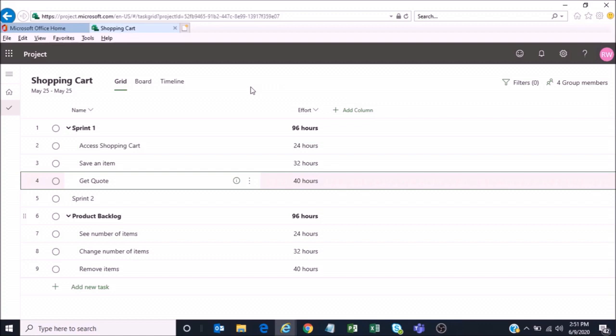Let's pause right here for just a second, because we're doing our sprint planning activity, and working with the product owner, we've identified these 3 tasks that we want to occur within sprint 1. But we have to think about the size of our team and the capacity this team can deliver. Remember, there are currently 4 members of the team: 1 product owner, 1 Scrum Master, and only 2 developers.